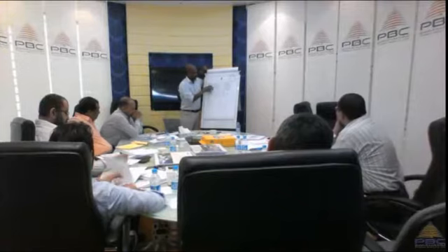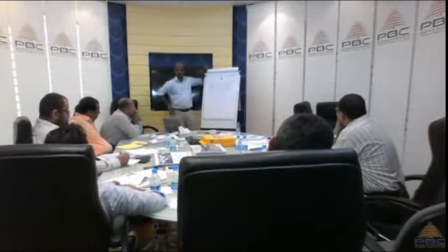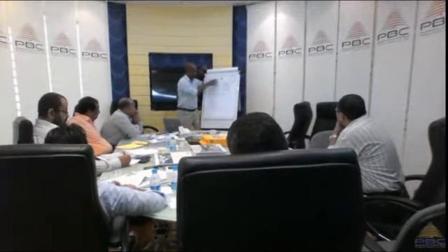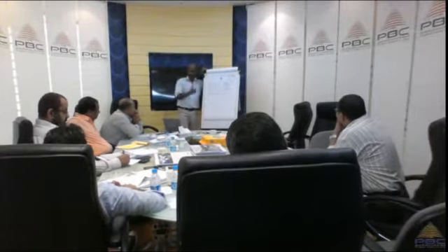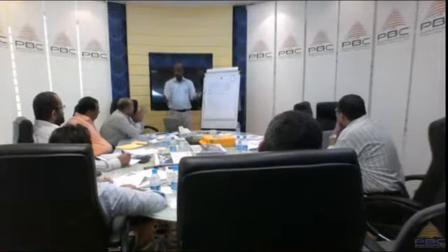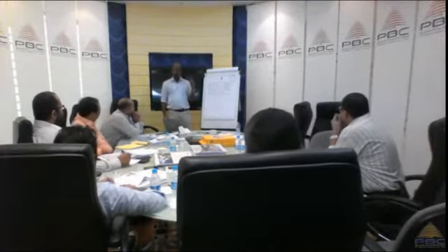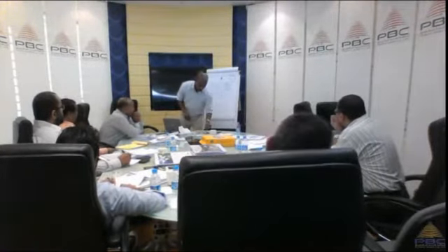By this stage, we say 4 sides, 4 days, $4, right? Now, by the end of day 3, what was the original plan? I.e., what's the value of the work? $3. Three sides, so $3. Exactly. So this is called the planned value. They call this value the planned value.